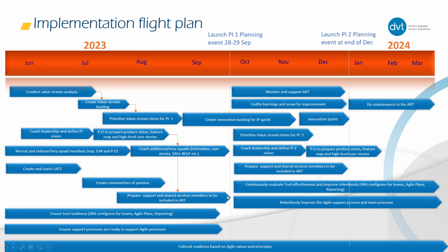And what I generally do is, if there's an activity that is in danger, I would generally make this block amber or green or red, and that would indicate which activity I need support on, or I need help on, or where we are fine. Okay. What a steerco is not meant to do, guys.